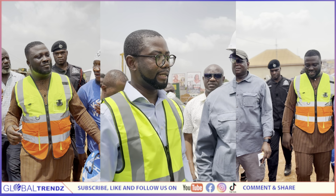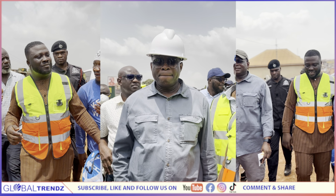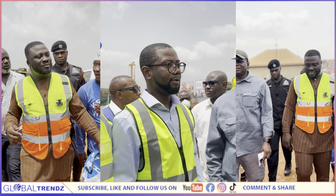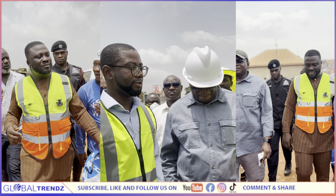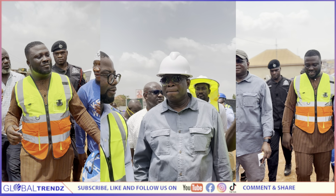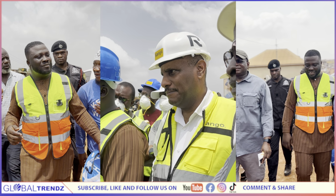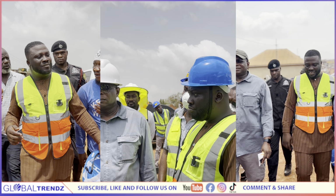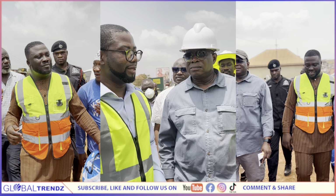Phase 1, which started a little bit late in April last year, the Suame Interchange, was funded also from an allocation from Afri-Exim, which was a replacement of Konongo to Ejiso for the purposes of us starting. It covered almost, I think, 48% of the total contract value, meaning there is a shortfall in funding in order to complete the work. But we've started the process, and we are committed to continue as long as the ministry can find a solution along the way to keep us together in full scope implementation.